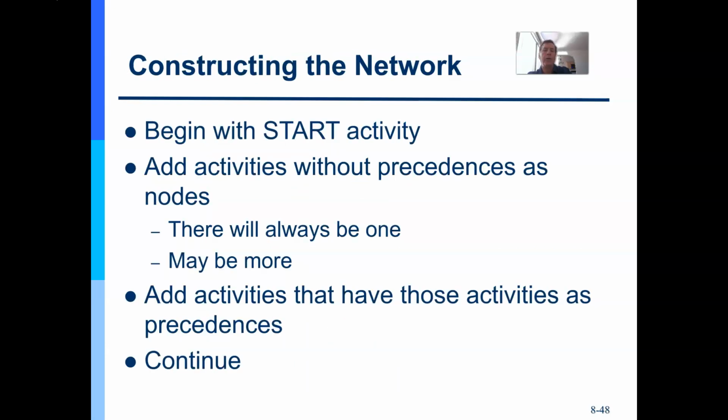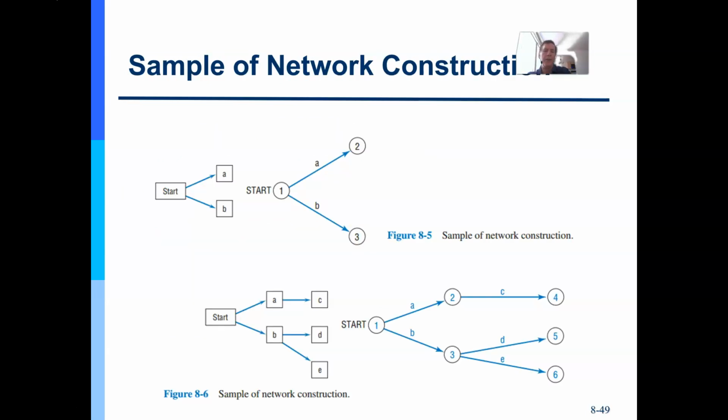Okay, so we begin with the start activity and we'll add times up together. So notice the start activity, and then I've got a couple of other activities. So notice here, if my start activity is day 1 and it takes 1 day, I will get day 2 here. But if this dependency arrow leading to this activity takes 2 days, I still start at day 1, but now it's day 3 when this is done.